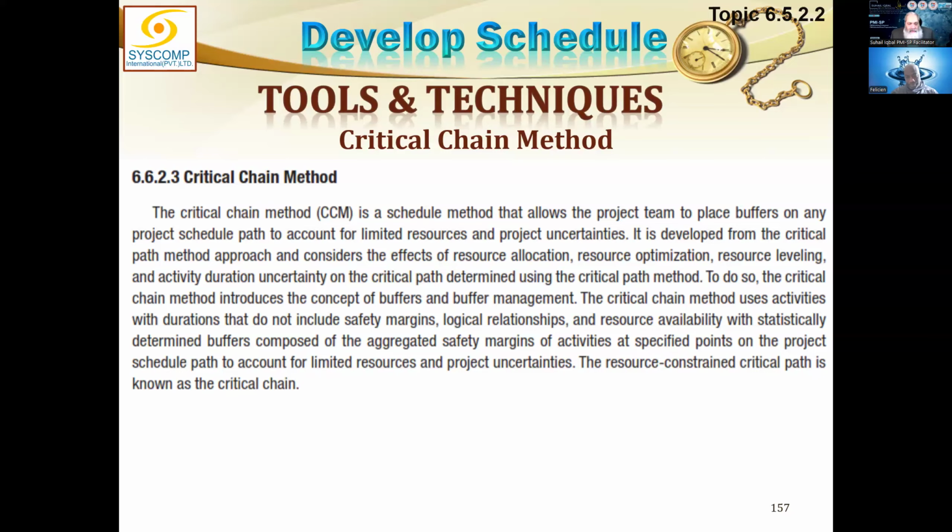Now, you could apply different rules for different tracks, but a simple method would be let us apply the same rule to the whole project. Let us cut everything by 20%. That way, no non-critical path will ever exceed the critical path, right? Because they're equally been reduced, right? So we can exercise our control over.